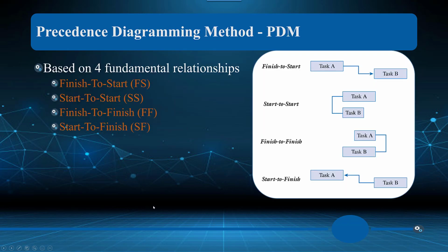So we looked basically at some precedence diagramming in that previous example. So if you notice, finish to start, meaning that the precedence here is that task A finishes before B starts. Start to start, meaning we can start these together. Finish to finish, meaning once both are finished, we can move forward.